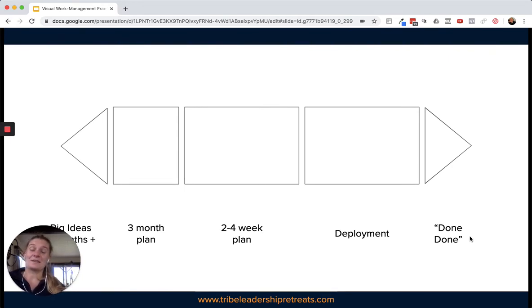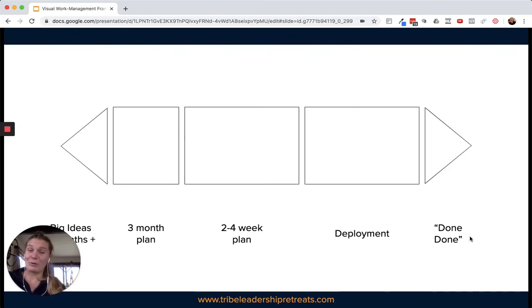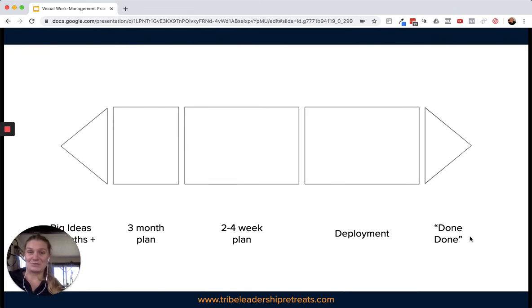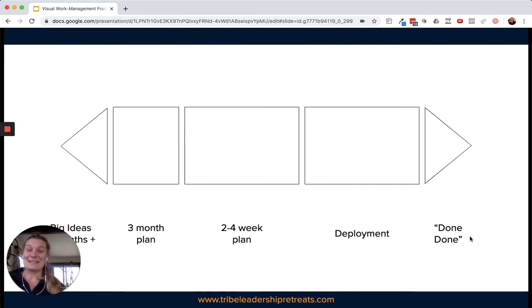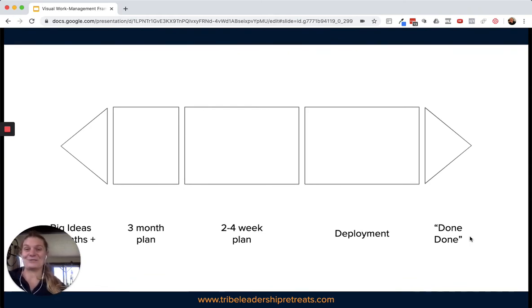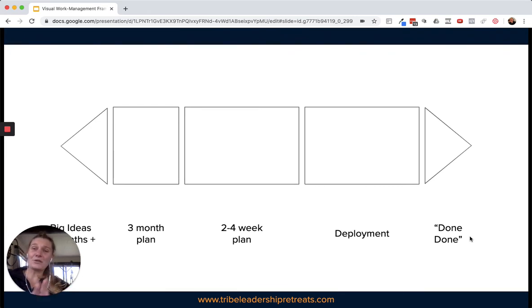This team actually built an entirely separate deployment wall so that we could track how our software was being moved into production. Then right at the very end, we captured our achievements and called it done-done, because at that point it was actually out there in the wild, delivering value to customers.